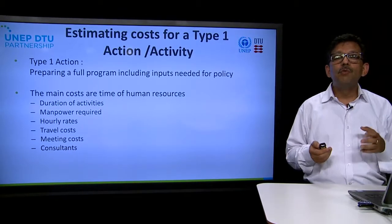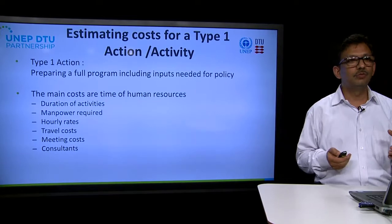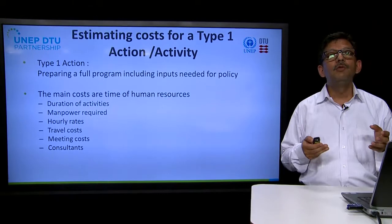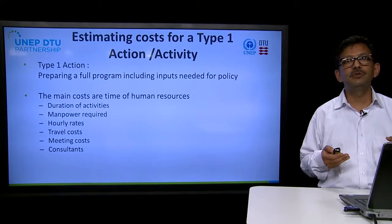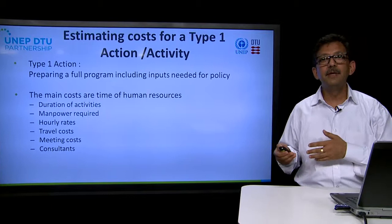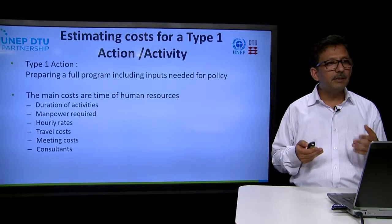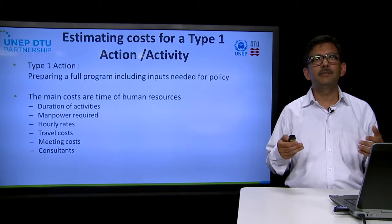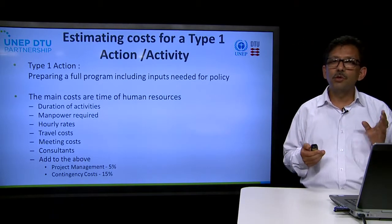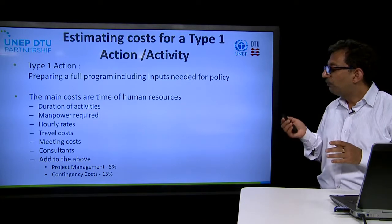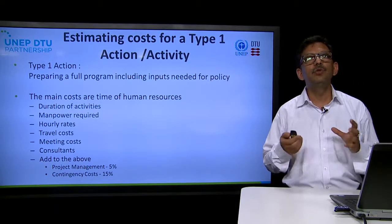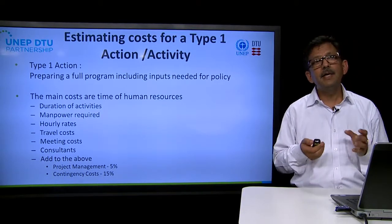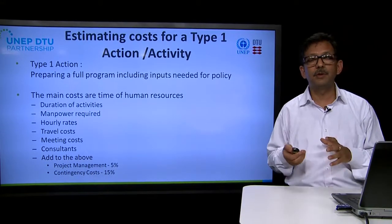In addition to human resources, we also need to keep some provision for traveling, so there should be a budget for travel. We should also keep in mind that there would be a need for stakeholder consultation, so there should be a budget for arranging meetings. There should also be a budget for engaging consultants — for example, for some analytical work. It is also good practice to plan for project management expenses, and typically around 5 percent of the budget could be allocated for project management.